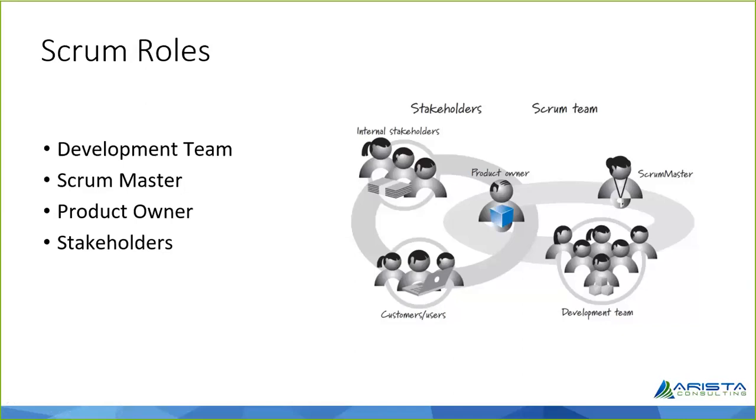But there are a lot of problems which could come up because of the stakeholders, or probably there is some technical problem, or some logistics problem, or an infrastructure problem. Anything that is going to defocus the development team from delivering the target within the time box, the Scrum Master is supposed to deal with, when the team is mature. When the team is not mature, his primary duty is Agile coach, and secondary duty is removing all the impediments or hurdles that the development team is coming across.